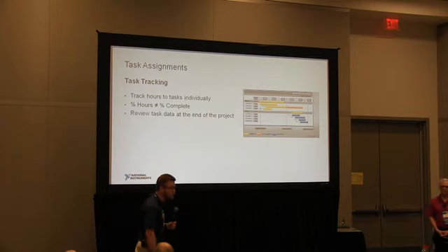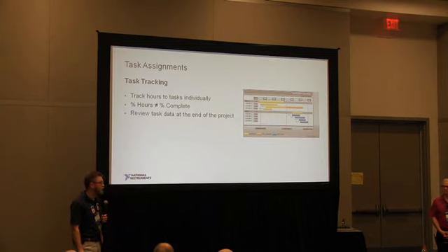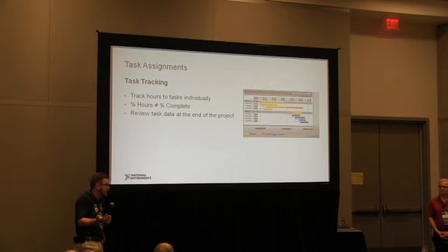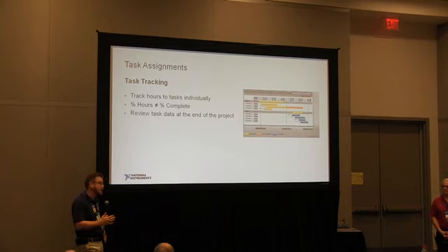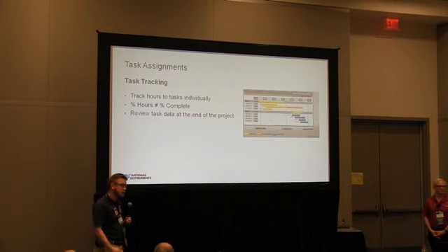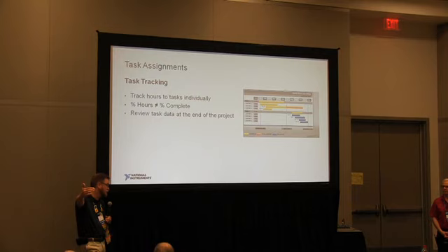And you get into it and you're like, wow, this is really a lot more complicated than I thought it was. Either you missed identifying it or it's just, sometimes it happens, it is harder. So yes, I think that needs to be brought up. You need to adjust your schedule. And a lot of times if it's a real big variance, you may have to take that back to your customer and say, this is a lot harder than we thought it was going to be, and that either adjusts your time frame or could adjust your cost schedule. So that's a good point.